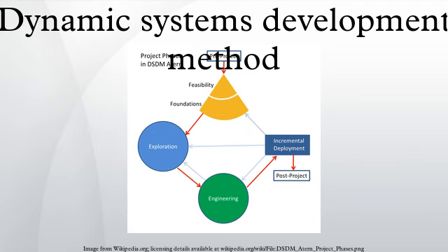The deliverables for this stage are a functional model and a functional prototype that together represent the functionalities that could be realized in this iteration, ready for testing by users. Next to this, the requirements list is updated, deleting the items that have been realized and rethinking the prioritization of the remaining requirements. The risk log is also updated by having risk analysis of further development after reviewing the prototyping document.